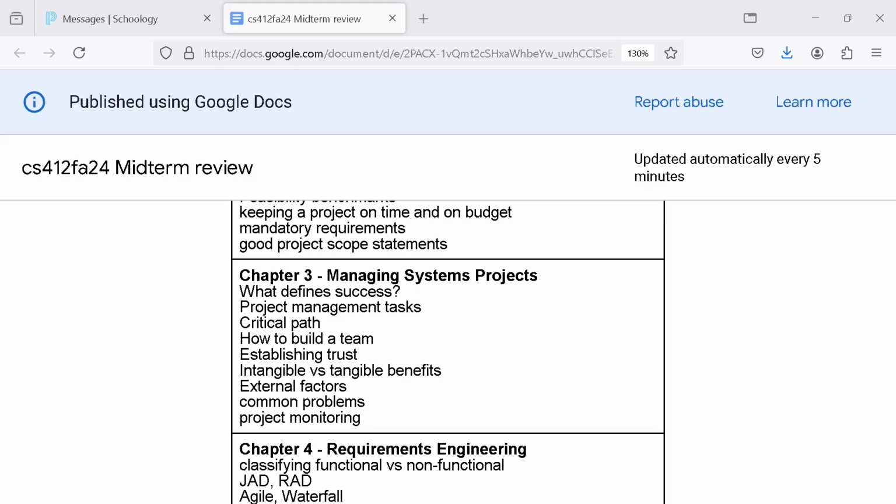And that's why these project management tools always identify the critical path. That's what the project manager focuses on: this piece of the project, if it's delayed at all, causes my end delay, or if I can save time on this little piece, it will get done before the deadline. We can deliver it ahead of time, which always looks good. If you're managing the project, you focus on your critical path items.